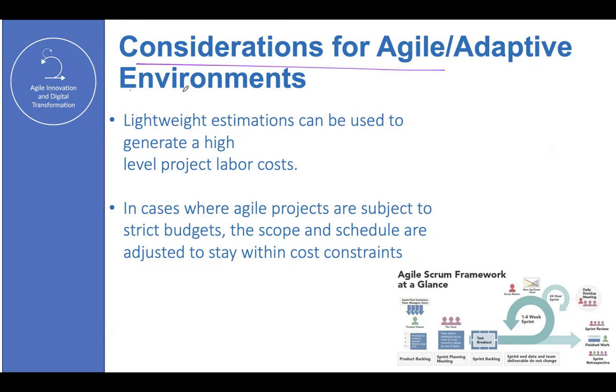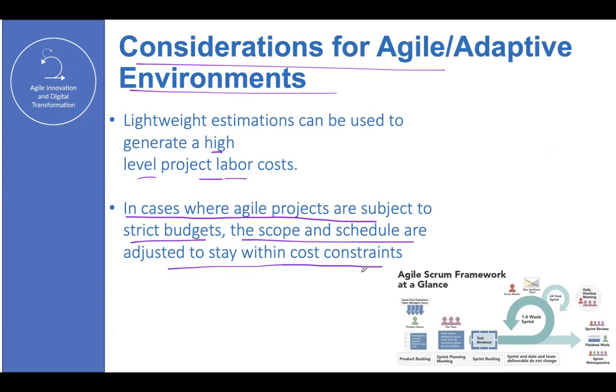Miss Taina, can you help me reading the considerations, Agile environments? Yes, lightweight estimations can be used to generate a high-level project labor costs. In cases where agile projects are subject to strict budgets, the scope and schedule are adjusted to stay within cost constraints. Thank you very much.